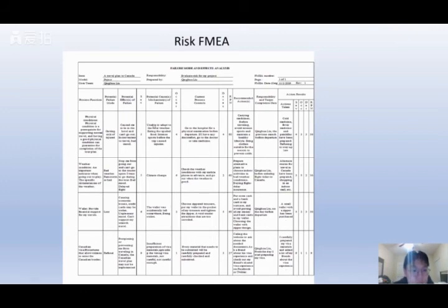So the severity here is 5, the occurrence is 4, and the detection is 4. So the RPN is 18 here. The actions taken, I think, are to bring cold medicine, fever medicine, and painkillers. And also refusing to stay up late is a good action to take. I think these measures can effectively reduce the RPN.